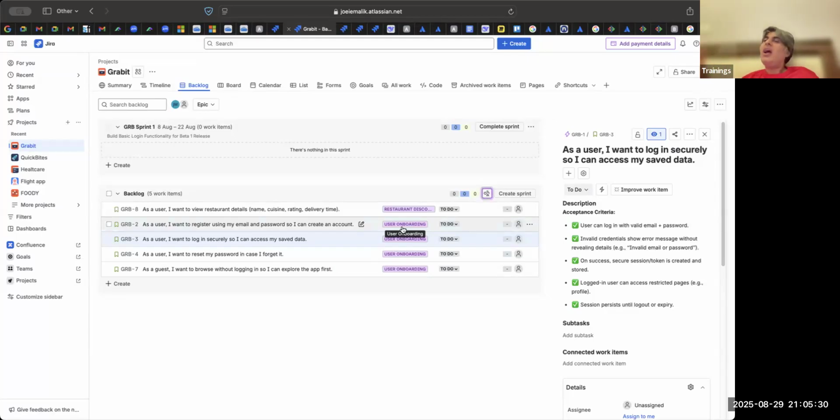So on a very basic level, you will have an epic. Epic is essentially a feature, and that feature will be subdivided into stories, or epic will be divided into stories. There are other configurations also, which I will talk about probably in the next session. In real time, you could also get initiatives, themes, features, epics. Typically, features are subdivided into sub-features, which are your epics, and those are divided into stories. We'll talk about that later on. Today we'll just concentrate on a very basic configuration.